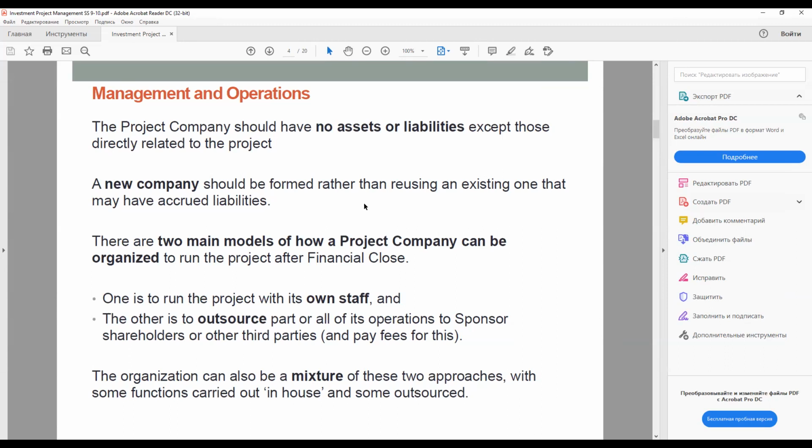The project company is often formed at a late stage in the project development process, unless project permits have to be issued earlier or it has to sign project contracts, because it normally has no function to perform until the project finance is in place. Sponsors may even sign some of the project contracts in their own name to begin with, for example a construction contract, and transfer them in due course to the project company.